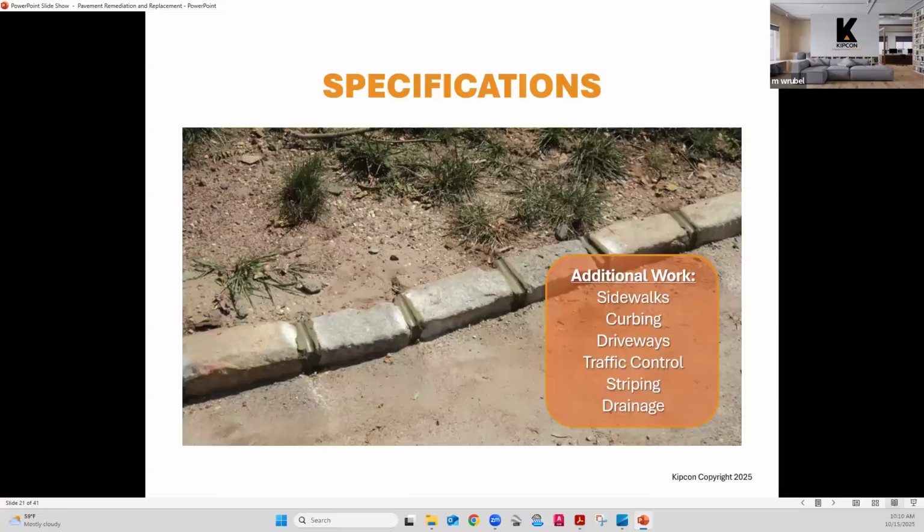Asphalt shingles are very heavy. You're going to be driving over your roadway. Get that out of the way first. Then driveways. Driveways have a different construction than the roadways. And to remediate those driveways, you're going to have to drive over those roadways with asphalt trucks to get to those driveways. So you want to do your driveway project next. Then tackle the roadways last.